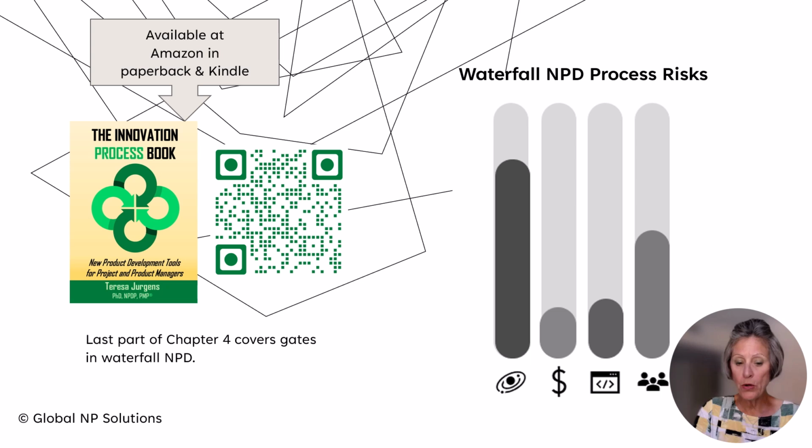Projects may also be put on hold due to special circumstances, such as when market seeding for the new product is not complete, or if there are not enough resources available for the project to be staffed appropriately. An NPD project cannot be on hold for any significant length of time due to the dynamic nature of the innovation environment and commercial marketplaces.